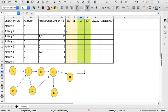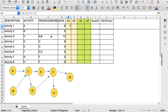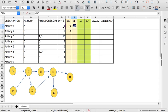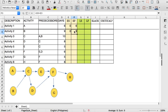To compute for the forward pass, we need to find out the early start and the early finish. For activity A, it has no predecessor, so the early start is 0 days — we can start right now. For activity B it's also 0. The early finish of activity A is 0 plus 6 days, and B will be finished on the 9th day.